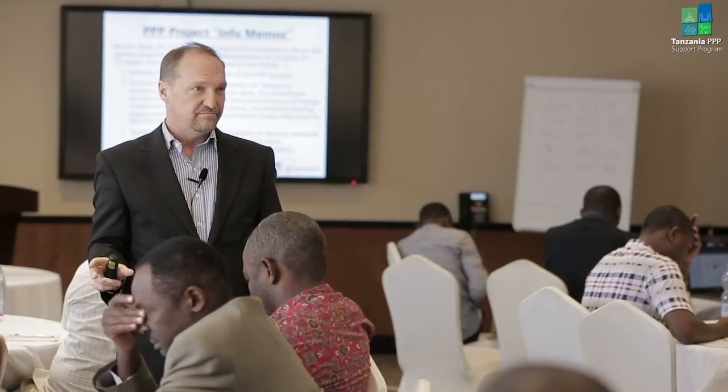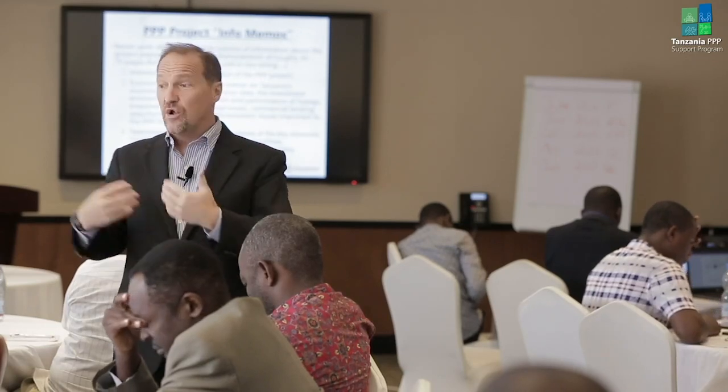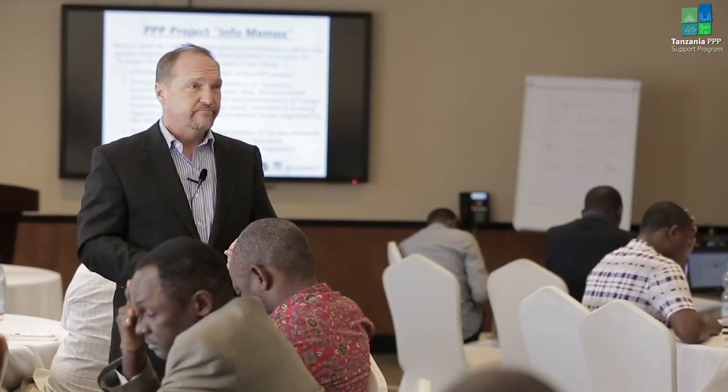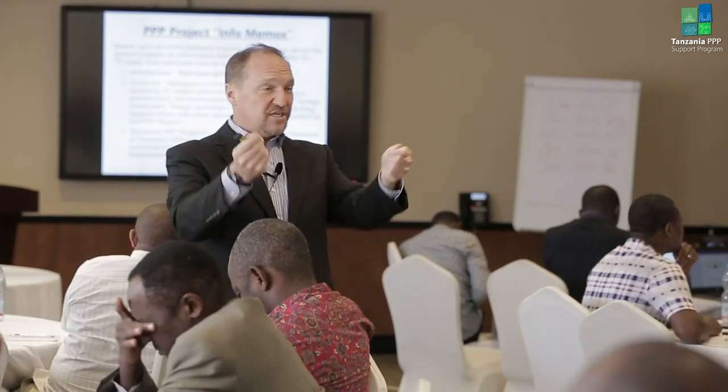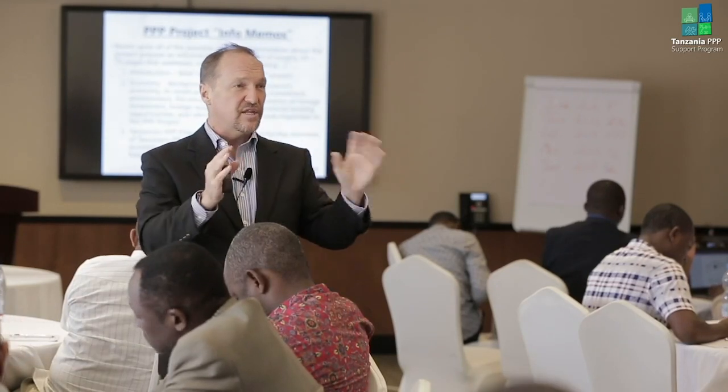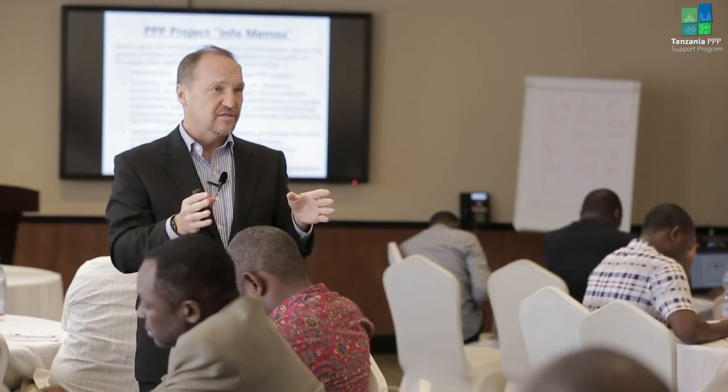When we've done the feasibility study, and now we've actually prepared a business case. So we're not only asking, is the project feasible, but what will it look like? How will the risks be structured? The allocation of risks. What will the output standards be? Now we want to give this to potential investors and say, this is what the project is about. You can read this, and this provides the essential information.